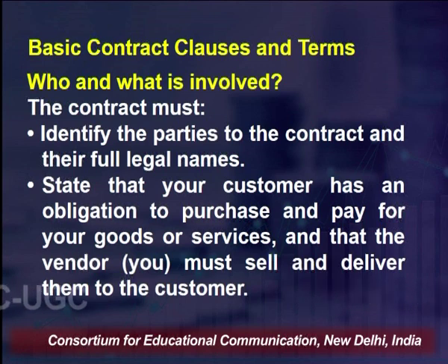Similarly, they need to state to their customer their obligation to pay, and when those obligations to pay for the goods and services arise. That means you specify a time period in the agreement itself, say 30 days from when the goods are delivered to the customer.